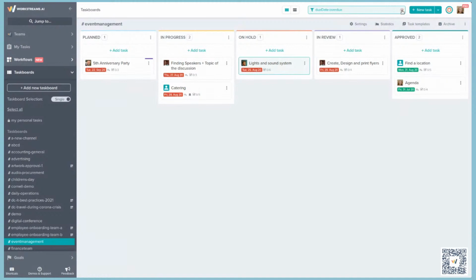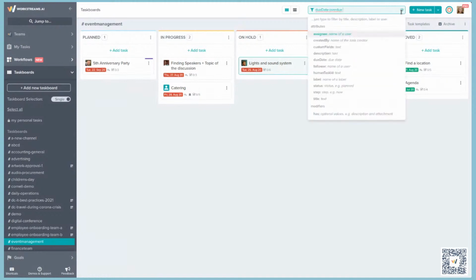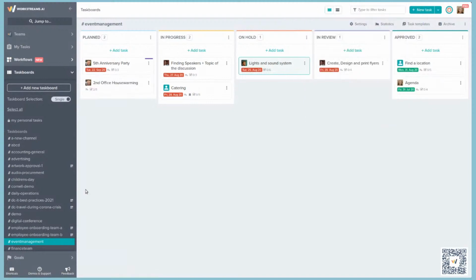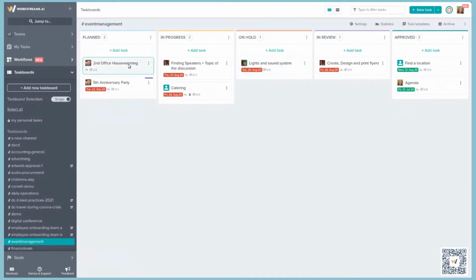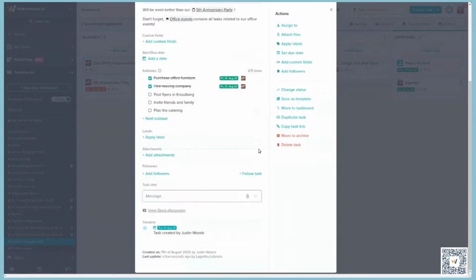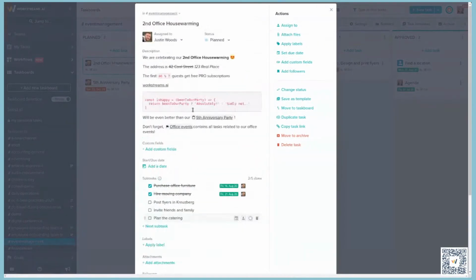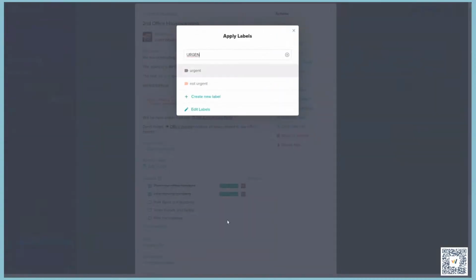Now, how do you handle urgent or important tasks? That's another great thing about the Kanban. Anything which is urgent or high priority can be put higher in the priority list. Ideally, it's about internal understanding that whatever is on the highest priority at the top should be processed first. Not everybody works the same way. What we can suggest is to add a label which would express that. So you can have a label which is urgent.